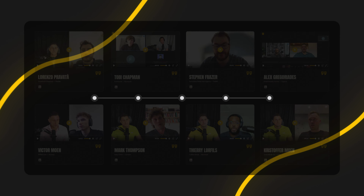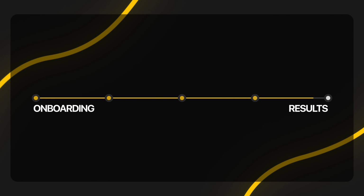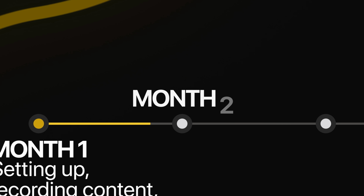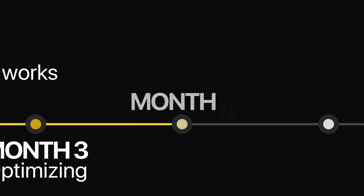Now, in the sales call, I always recommend showing a roadmap. And if you want to know what a roadmap is, it's basically look at all your previous clients. From the first thing you did with them, the onboarding, to Z, which is getting the result that they obviously came to you for, what are all the different steps in that process and the timelines between each step? For example, when we used to run Facebook ads and content, month 1 would be setting up, recording all of the content, optimizing the website. Month 2 would be testing the ads, figuring out what works. Month 3 would be optimizing. And then month 4, month 5, month 6. And we'd have little touch points at each month. So the client knew exactly what was coming.